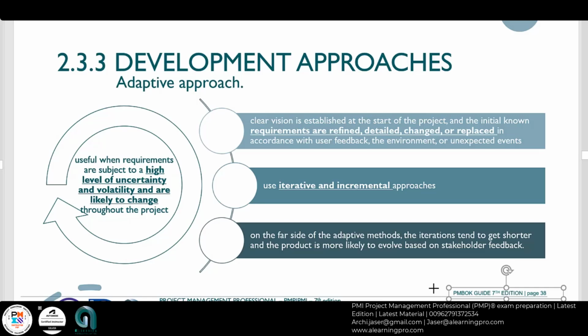It's not easy to manage for construction, but if you have a huge project or a mega project, it's split into zones and buildings. You start submitting buildings. For example, for the MENA district beside the MIA Museum, they have opened the Books Park, but still the project is working. So people can go there, buy food, and you can go by car. And now they have started opening the retail shops for rental. The retail shops in the MENA district are still being built, but people started renting those retail shops. So they have opened on increments, but it's not very common in construction, by the way. It's more into website design, app design, IT, those creative fields.